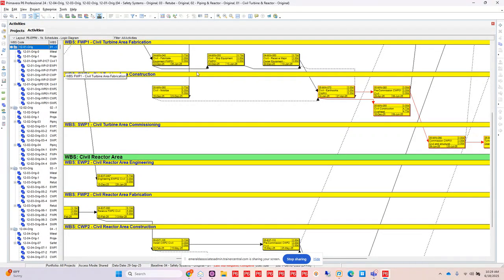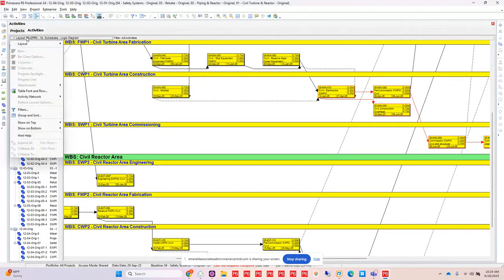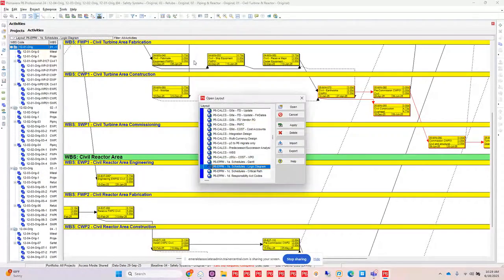Now, you've put together your list of tasks. You develop your durations. You've got your logic all set up in there. And really what this is heading towards is finding out how long it's going to take for you to deliver that project. So we have these red lines that start showing up in our Gantt chart, and these represent our critical path on our project.